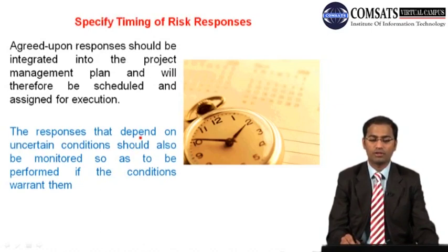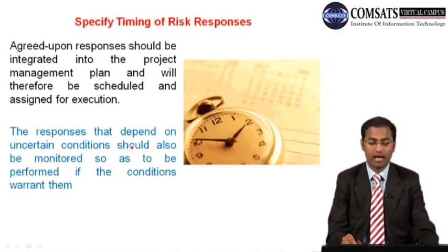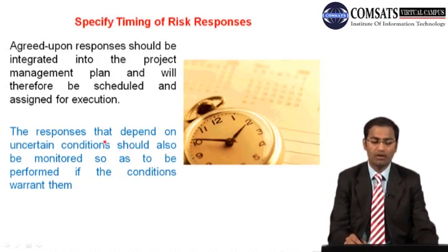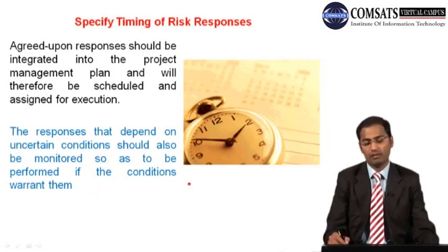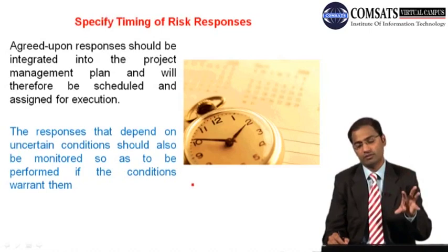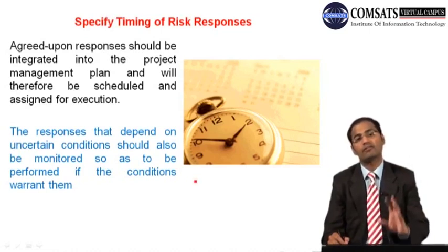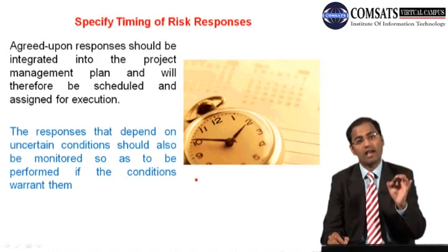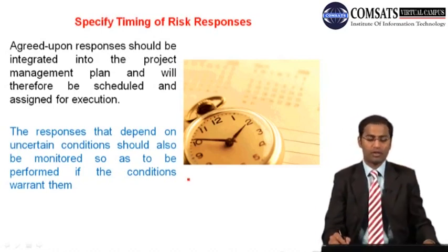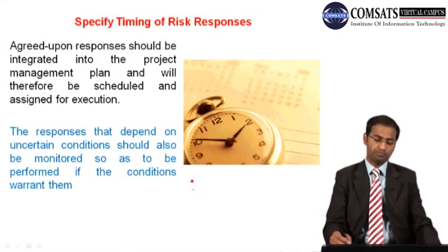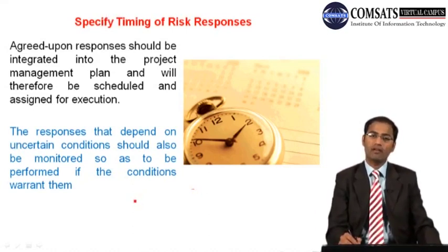Agreed upon responses should be integrated into the project management plan, schedule management plan, and cost management plan, and will therefore be scheduled and assigned for execution. The responses that depend on uncertain conditions should also be monitored so as to be performed if the conditions warrant them. So timing is very important. Remember, there is a difference between the timing of risk responses and the frequency of performing the plan risk response process. As I've told you, there is a frequency for every different process.